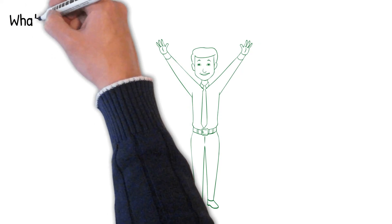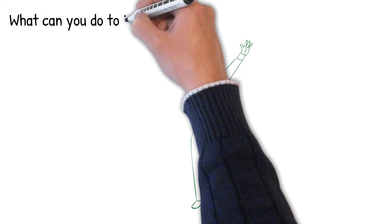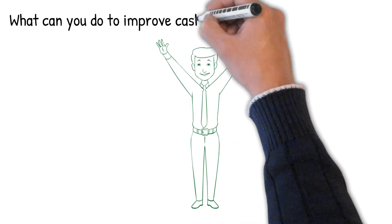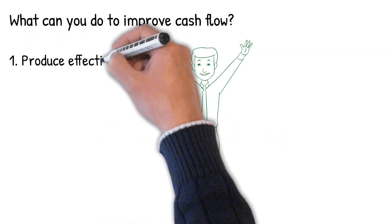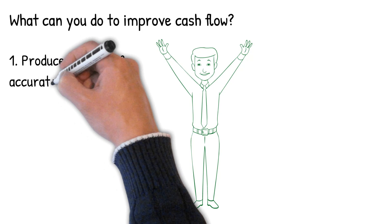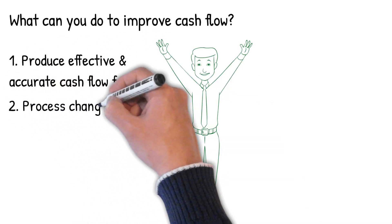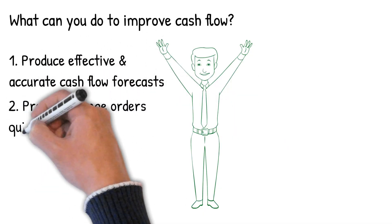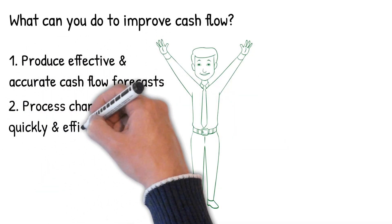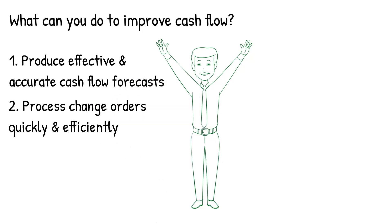So how can you improve cash flow? Well, let's start with the obvious: producing effective and accurate cash flow forecasts. Process change orders quickly and efficiently — agreeing additional works and payment is essential to keeping your cash flow positive. The longer disputes over additional work carry on, the more likely it is to affect the cash flow.